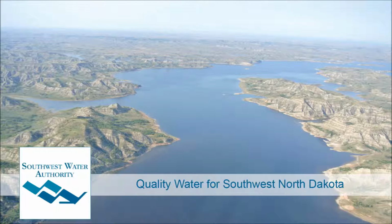That's 1.6 million gallons, so we do expect that tank to be turned over for service fairly soon. We've talked about the Dunn Center tank, which is up, and they will be working on painting that. The Killdeer Mountain tank, which is southeast of the Killdeer Mountains, the interior's been painted. It's kind of late in the season for painting. With cure time and temperatures, it's pretty dependent on temperature and humidity, but we're hopeful to be able to get tank painting done prior to freeze up this year.